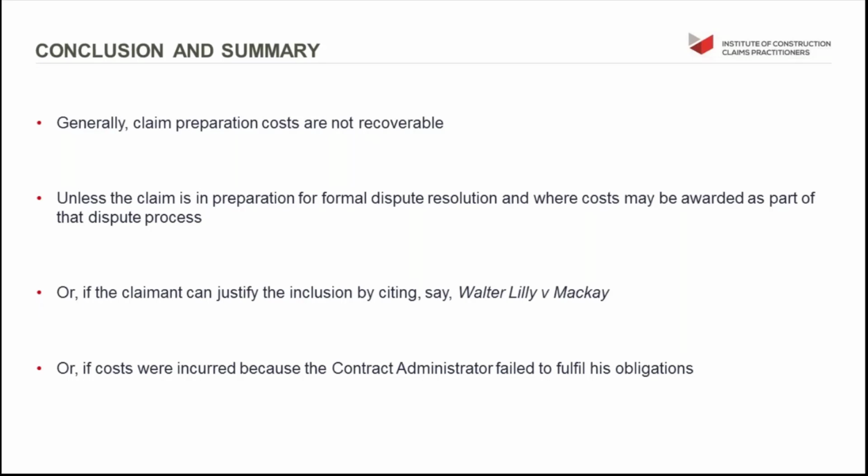We don't often look into why you can't get that, but today we've looked into it and we've seen that the reason is it's because of your contractual obligations, either to produce full particulars and substantiation as part of your contract obligations, or that your obligation is merely to provide a notice and to retain the records for the contract administrator to ascertain your entitlement.